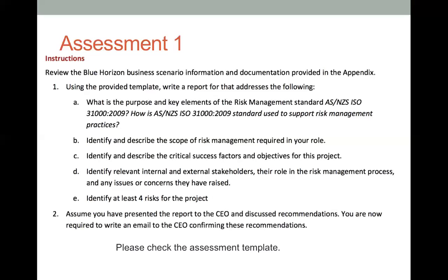We also need to get our promotion materials on time. What do you mean by on time? Well, it should be completed by week 4 of November, for instance. If we delay until week 1 or whatever, we will promote the product late in the market, so we cannot achieve the objective. Okay? And the next one is stakeholders, right?